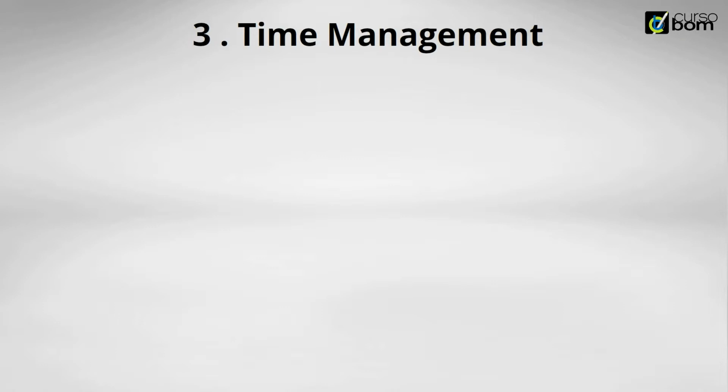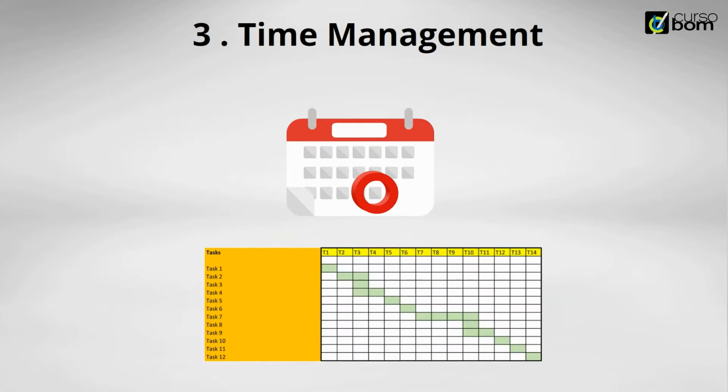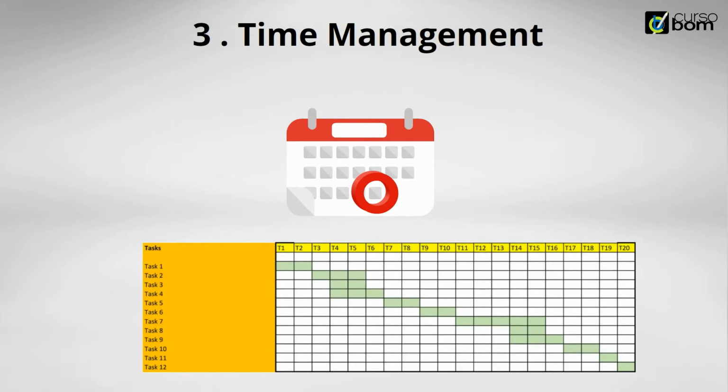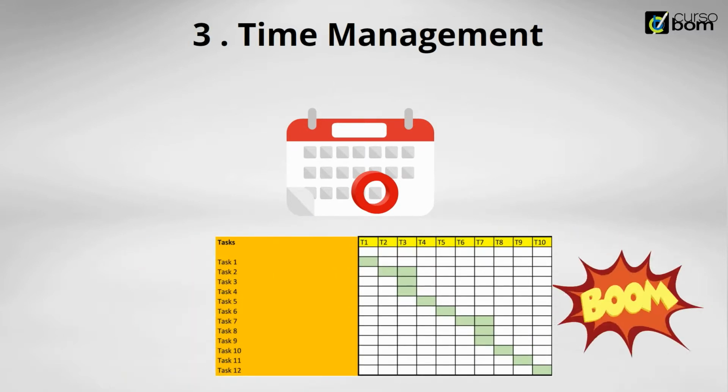3. For having an objective, a project usually has a deadline to be completed. The deadline is more or less flexible depending upon the specific situation. Intermediate deadlines for project tasks are usually represented in a project schedule. The schedule shouldn't present any task after the project's deadline. Expanding or compressing the project's execution time can also increase its risks.